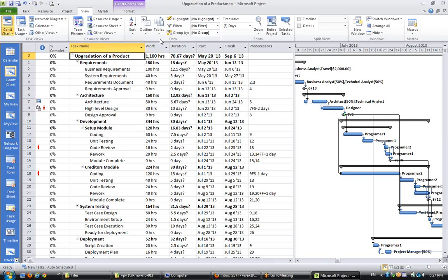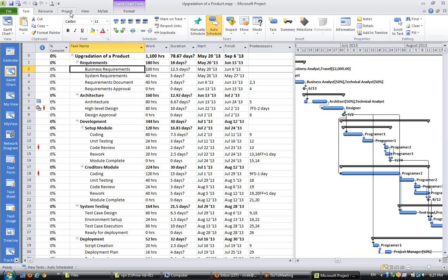Right? So now let's do the first step towards tracking, that is the percentage, using the method of percentage update. Now if you go to the task tab, you will see that you have this 0, 25, 50, 75 and 100%.